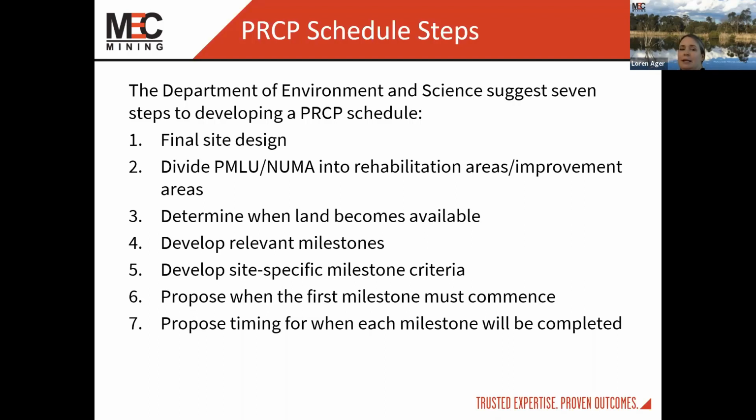These parameters, I guess, are site specific, and they need to facilitate the subsequent milestone that happens afterwards. So there needs to be a flow of progress. You can't just start topsoiling when you haven't profiled. There needs to be a consecutive understanding about what happens next in the process. The next one is proposing when the first milestones must be commenced. So rehabilitation or management milestones must start as soon as practicable and after the land area has become available for rehabilitation or management.